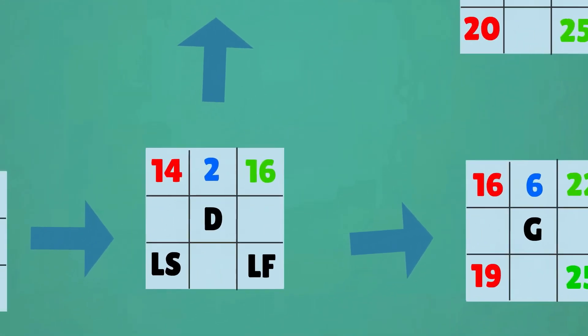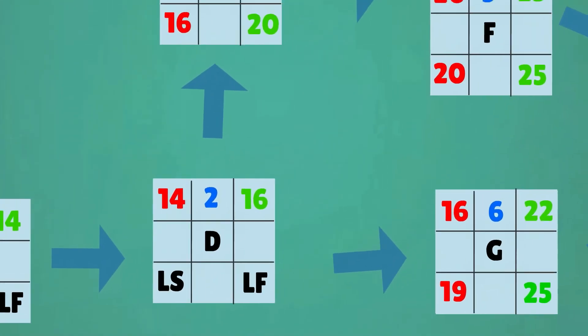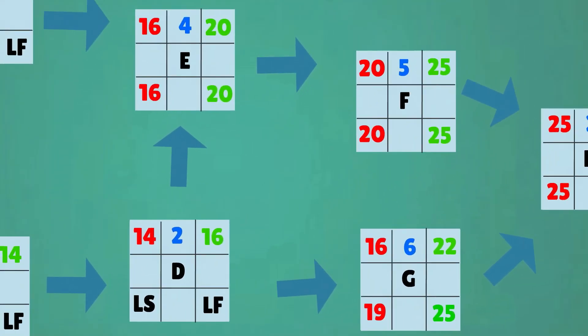With activity D, there are two possible late finish times. As the project should not be delayed in this reversed approach, the earliest late start is used as the late finish of activity D, in this case week 16.